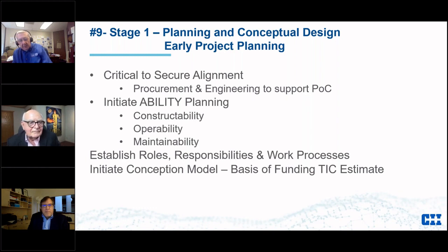And when I talk about procurement, this is what I call a fragmented process. A lot of our owners want to do the procurement on the owner side. Now, you got some owner procurement people, and we're down here in Louisiana, those buyers may be in New Jersey. You know, they don't care about your project. They've just been told to buy stuff, and they've been told to get the best price. So they got plants coming in from five different locations, and each one needs five pumps. So they're going to try and put them all together and get the best price. They don't care about your schedule. They don't have a commitment to it. So you got some real issues there on the procurement side if you're not in control of the procurement. So it's just a warning there about a fragmented process.